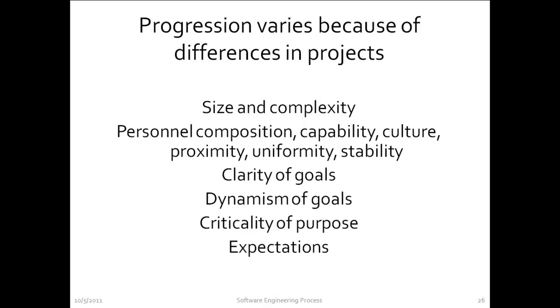Another factor is criticality of purpose. Saving or impacting lives is the mark of a critical project. The next level of criticality might be profit orientation. In other words, the company's business depends upon the project, or the goal of the project might simply be entertainment. A mission critical or life critical project will spend a lot of time in inception and elaboration because the team will want to make sure that they've gotten things right before they actually try to build it.